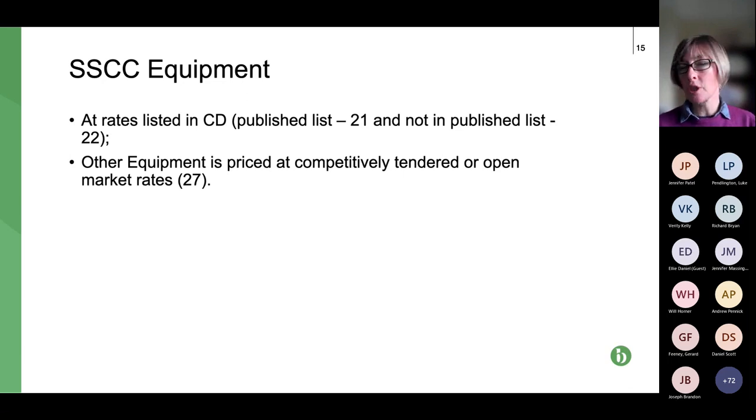So in terms of the shorter schedule for the equipment, this is I suppose the important bit, in that it's talking about potentially big pieces of equipment, whereas the charges element, hopefully, will be small pieces, so small sums of money involved. So what are you entitled to claim? Well, the equipment is payable at the rates listed in the contract data. So this is where we say there's an interlink between the contract data and the schedule of components. So therefore, what you are entitled to be paid.